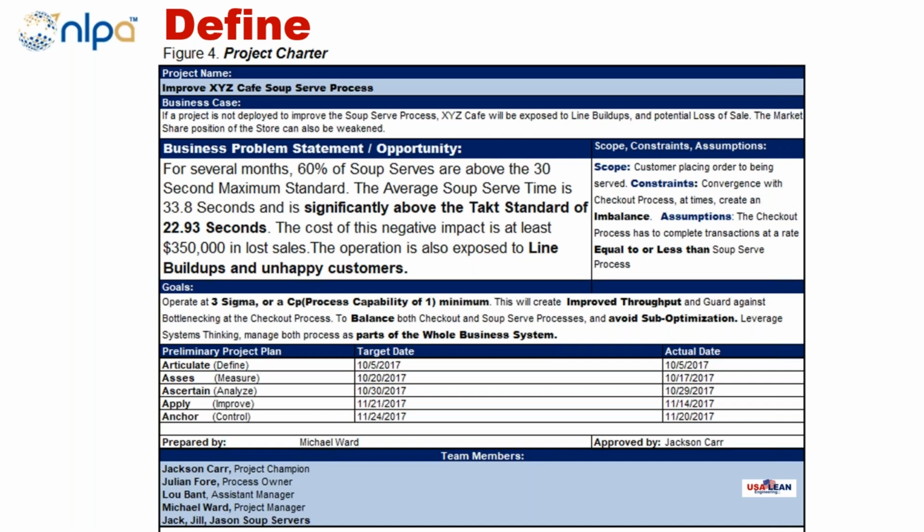Because again, I mentioned boiling the ocean, so you have to make sure of the start and the stop points of a particular process that you're going to address, or processes. If it's more than one process, you're going to address a certain section of a process, that's very, very clear, and the scope and the timelines are very clear, to guard against scope creep.